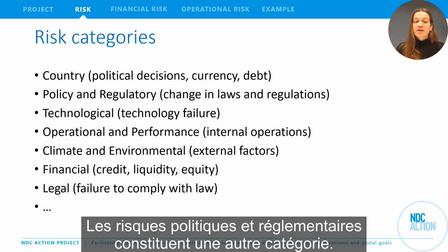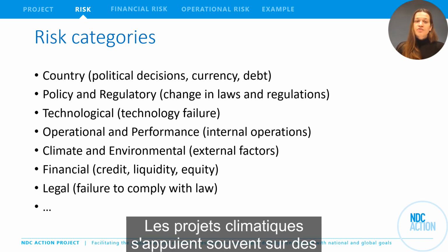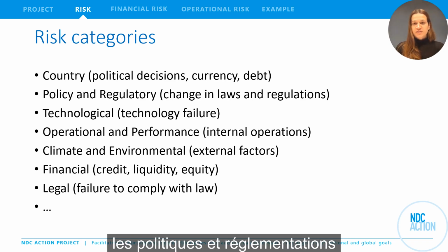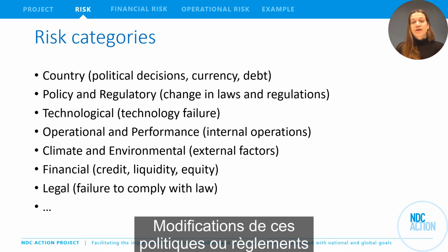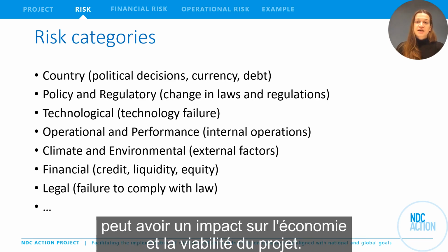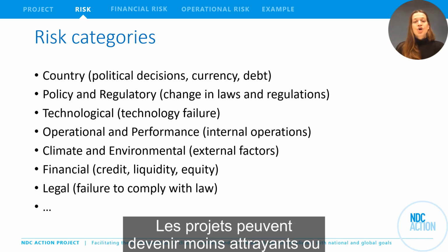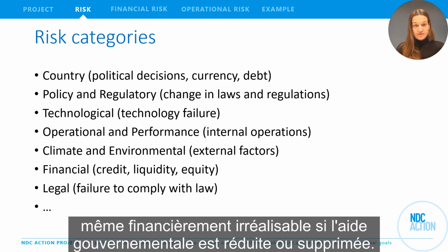There's policy and regulatory risk, and they are another category. Climate projects often rely on favorable government policies and regulations to receive incentives, subsidies, or support. Changes in these policies or regulations can impact project economics and viability. Projects may become less attractive or even financially unfeasible if government support is reduced or withdrawn.